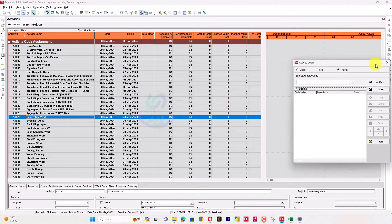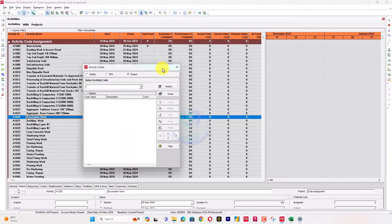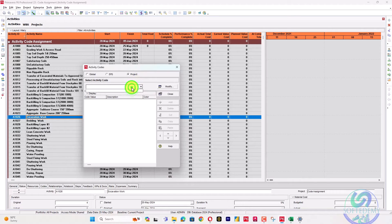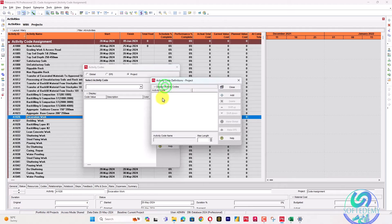There are three types of activity codes: global, EPS, and project. If I assign a project code, when this project is transferred to someone else, the project code will appear in their system via the XDR file. Project codes are transferred with XDR, while global codes are not transferred in XDR but are transferred in XML.